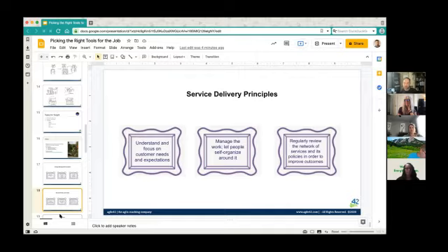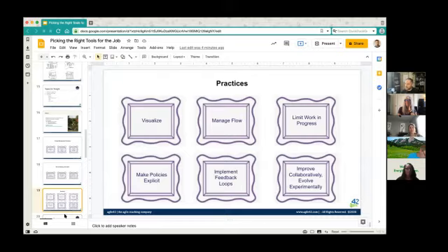So what you probably see coming out here in Kanban is you're starting with what you do now and finding the small improvements on it, but relentlessly pursuing those improvements. And then they have a couple practices that support this. Visualize your work. Whatever your process is, visualize it so you can watch work flow through it. Manage that flow. If things are getting caught up places, there are bottlenecks. Try to address them, right?